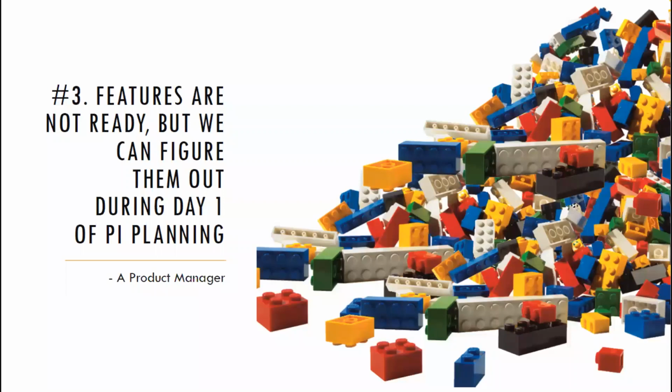And of course, Sadik, you can start using a user story map to identify the walking skeleton. But notice that if we think about delivering in an incremental, iterative way, yes, we need to focus on what is probably the MVP version of this main epic. Okay, so yes, we can rely on this as long as this MVP does not extend beyond the PI or beyond the quarter. So notice that in order to get there, you need to have preparation.